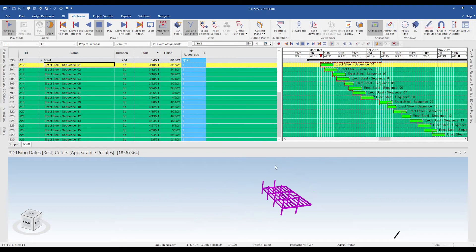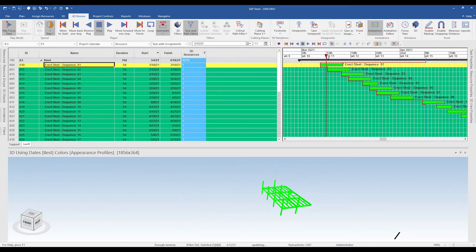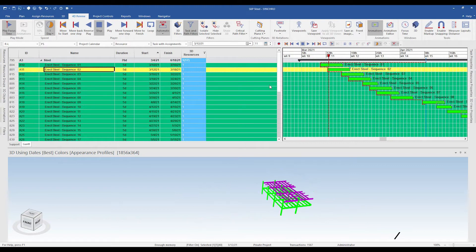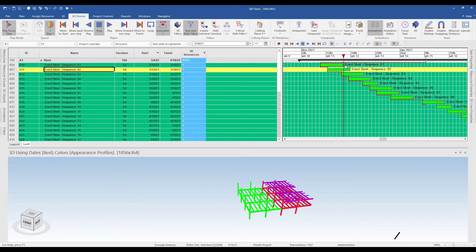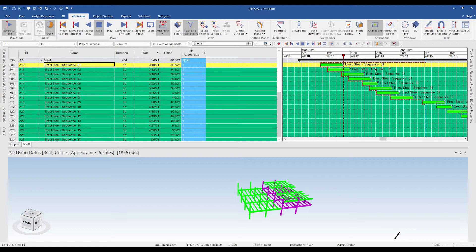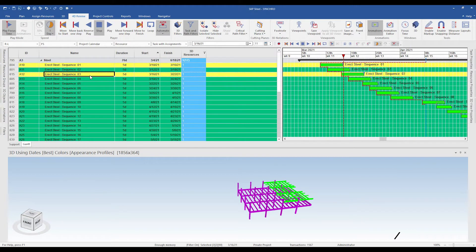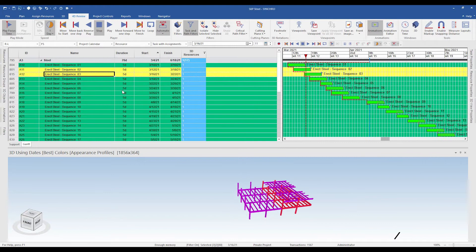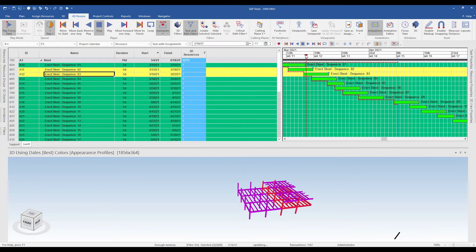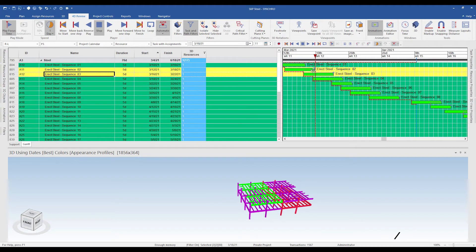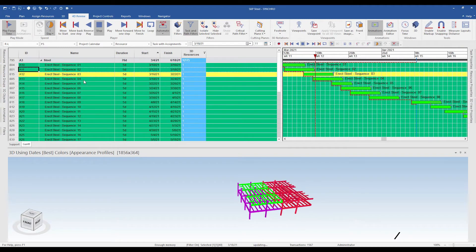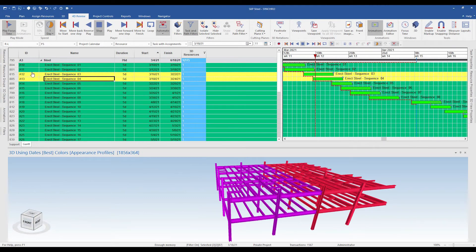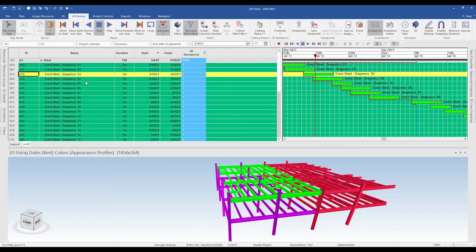Playing this, we have sequence one being installed and at around forty to fifty percent completion, sequence two starts being installed. Once sequence one is completed the team jumps to sequence three. At any particular time we have two steel sequences being installed. Once sequence two is completed, we have sequence four being installed — so here again we have sequence three and sequence four being installed simultaneously.